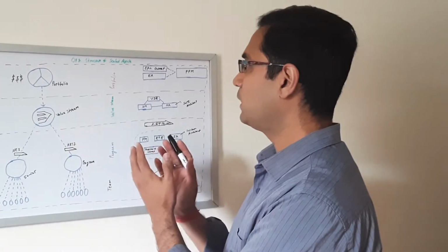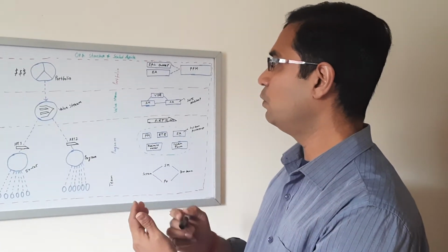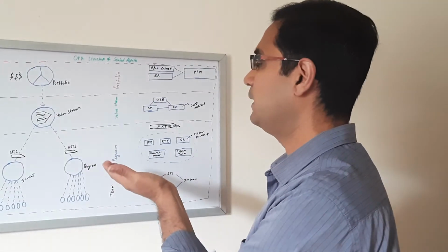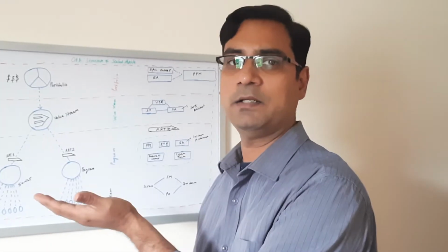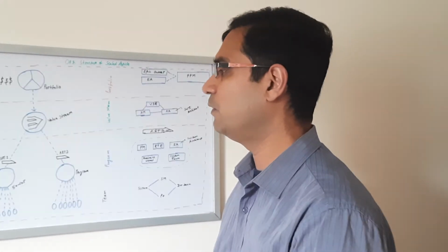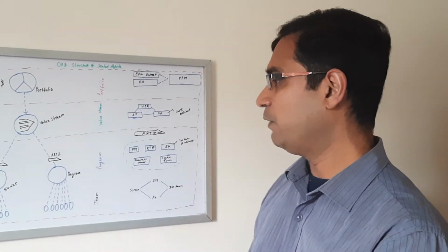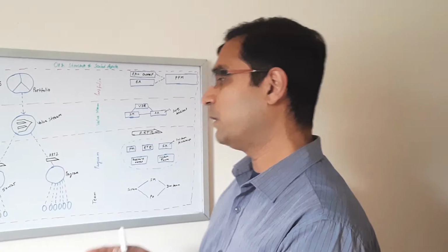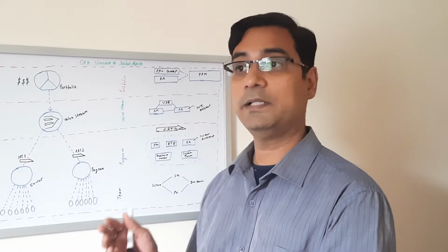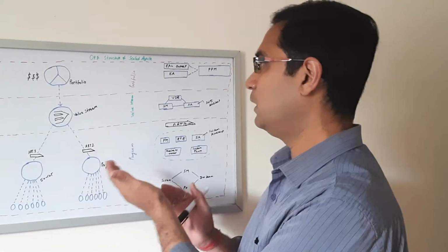Scaled Agile is used when you have to scale your agile way of working. And why do we need to scale it? There are several dimensions which we generally think about when scaling an agile framework. One dimension is when you have a team size of more than 50 or more than 100 people, then it's very difficult to handle by one product owner, and then we need to scale the framework. So the structure needs to scale, and that is one reason.